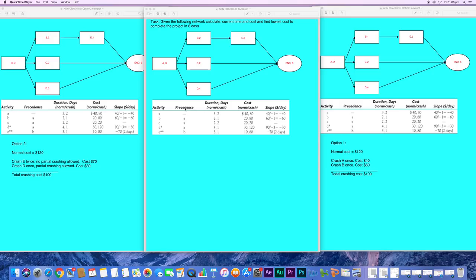So problems can be formulated like that. It can be combined. An AON formulation can be within some other problems. So that can happen in your quiz as well. It's really easy to develop this network. A doesn't have precedence, so that's the starting activity. B, C, and D all start after A. Okay, they're all here. And then E is after B, and that's the end node.